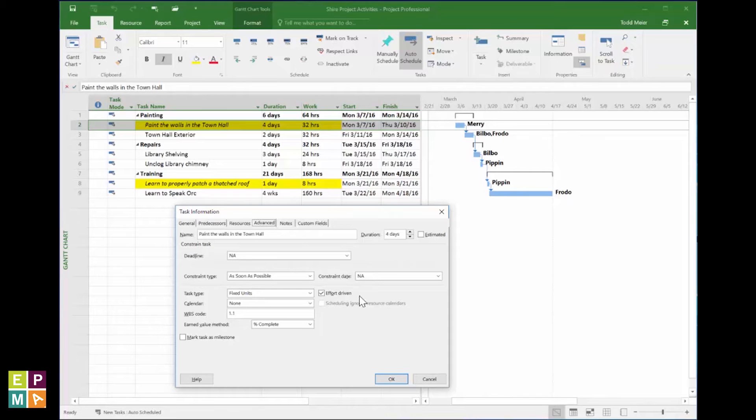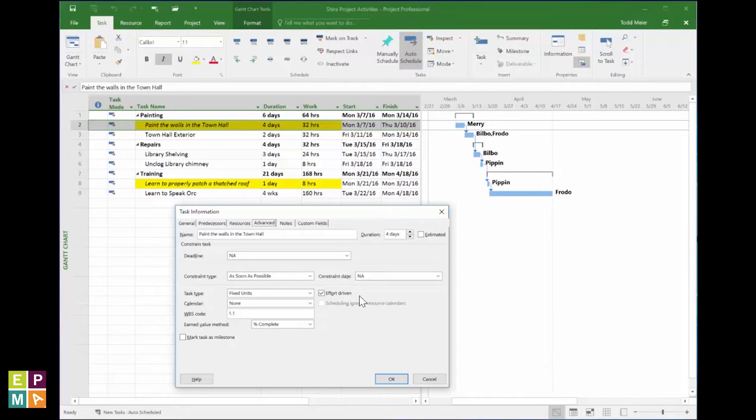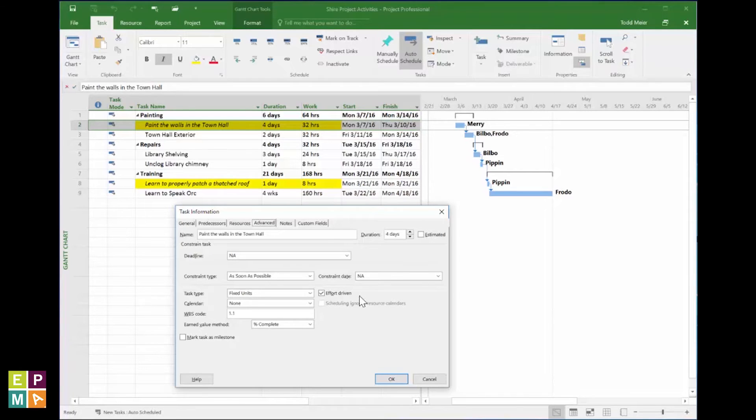This effort-driven spell decrees that any additional Hobbit added to this task will be able to share an amount of the task's planned labor, thus potentially reducing the total time it will take for the task to reach its outcome.